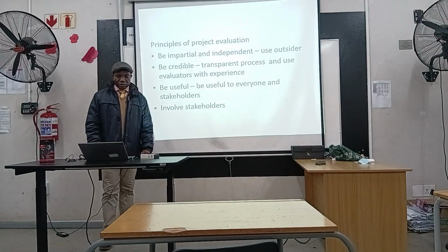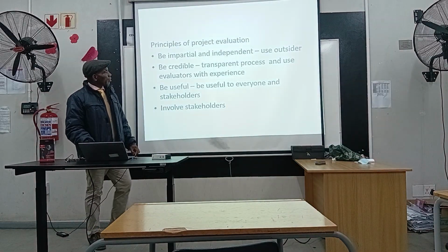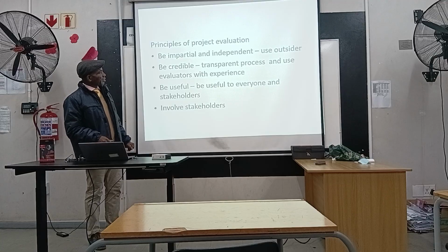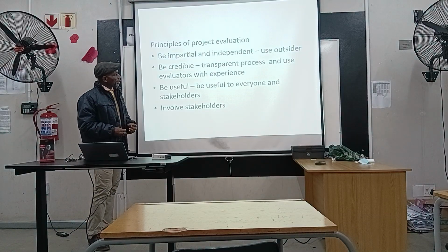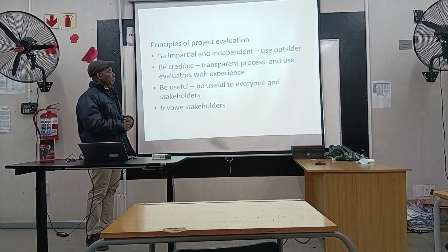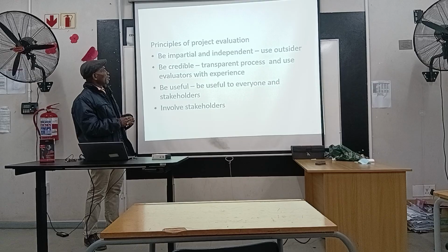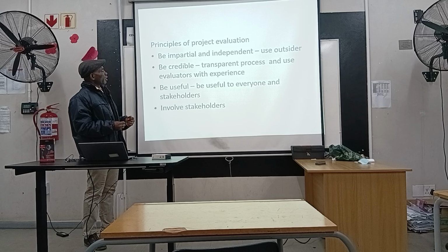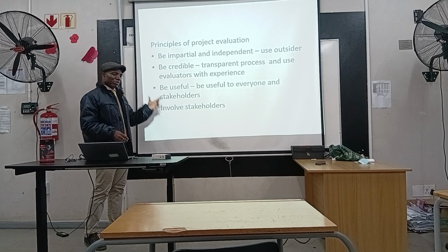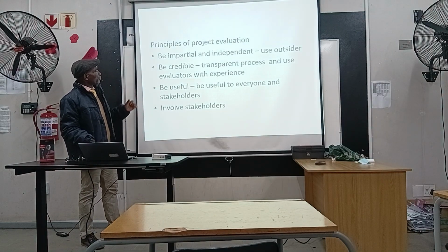Then here we are going to talk about the principles of evaluation. It's very important for the outcome of evaluation to be credible. So you need to make sure that the people doing the evaluation are outsiders. We prefer to use outsiders, because outsiders stand to be impartial in most cases and independent. So what we are trying to say is that evaluators should be impartial and independent. It's one of the principles of project evaluation.